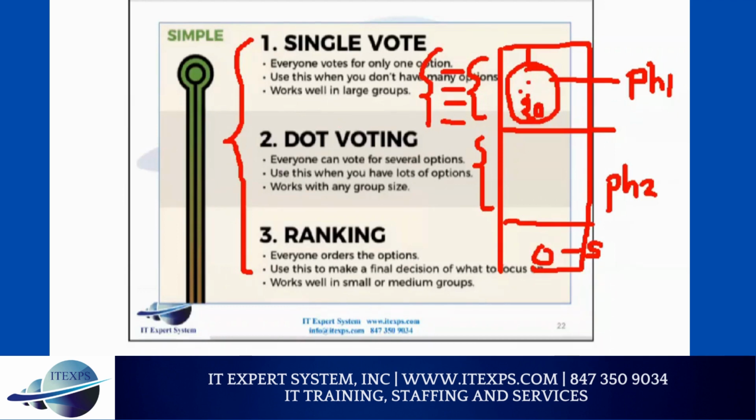Question. So these are the ways to prioritize requirements, right? Many ways. If you are sitting in one room, you can give them sticky notes, and they can say red means high priority, blue means low priority, and green means very low priority. You can do that. Or you can do the dot method: more dots means more priority. Everyone has a dot.